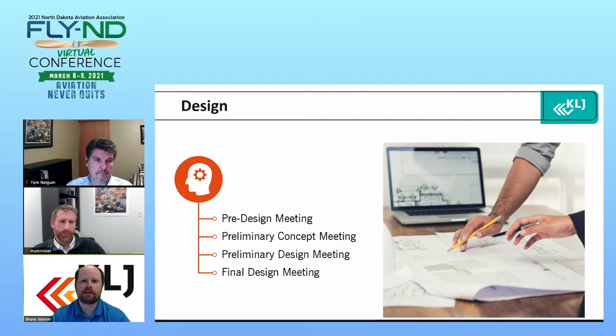So then after that, that's the home stretch, right? We see the light at the end of the tunnel for that final design. So with the final design meeting, we take everything from the concept meeting, the preliminary design, and everything from the stakeholders. So hopefully that final meeting is just the frosting on the cake, so to speak. Everything is nearly about 90% complete. So any last minute quirks can come up at that final meeting, and from then we can finalize the plans and the specifications.